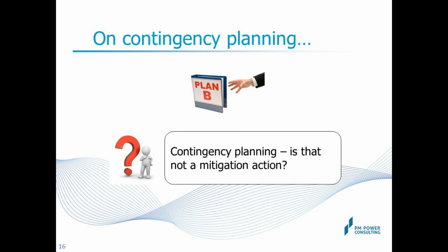The act of contingency planning itself does not reduce the probability of the associated risk event. However, it does reduce the actual impact of the risk, but that is only after the risk event has occurred. Hope it is clear.